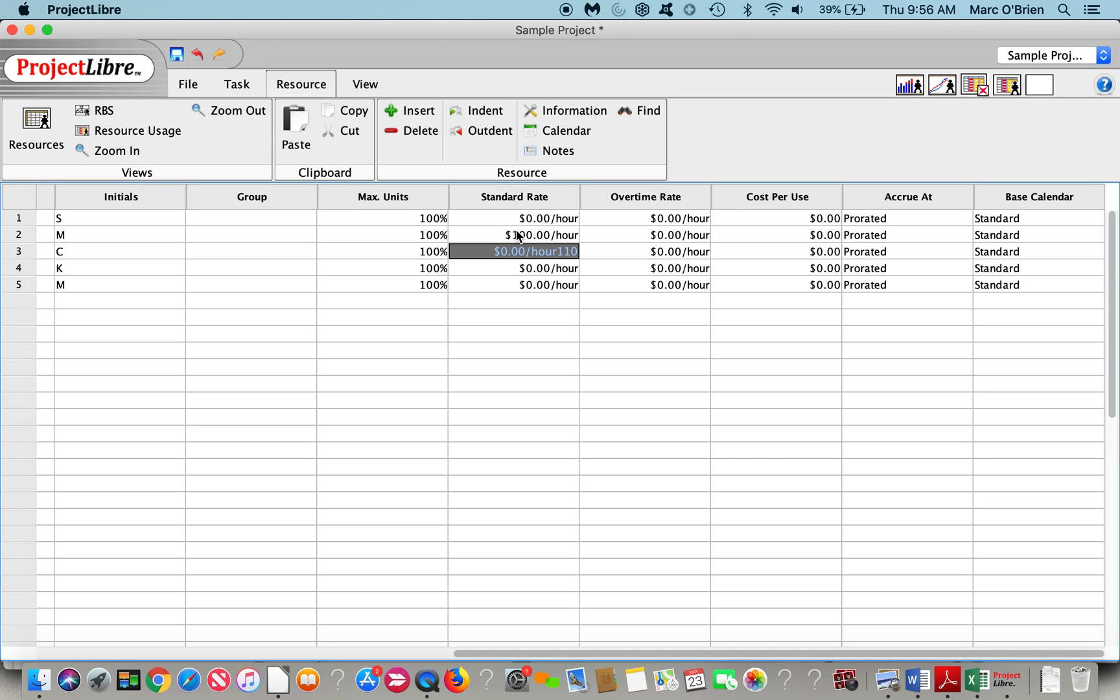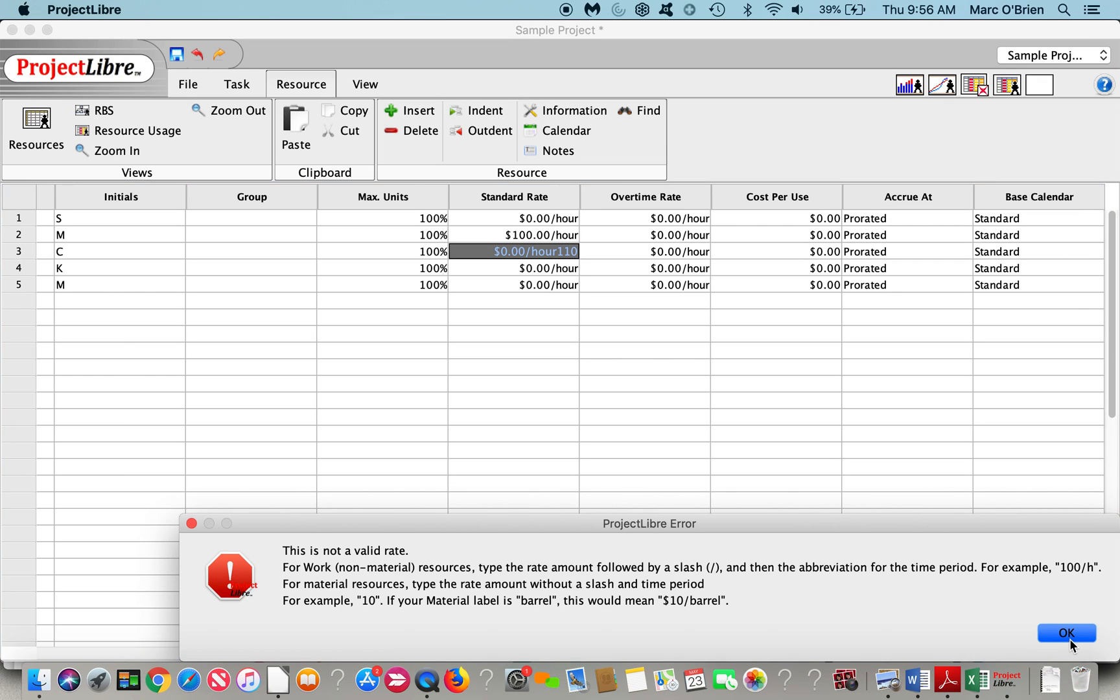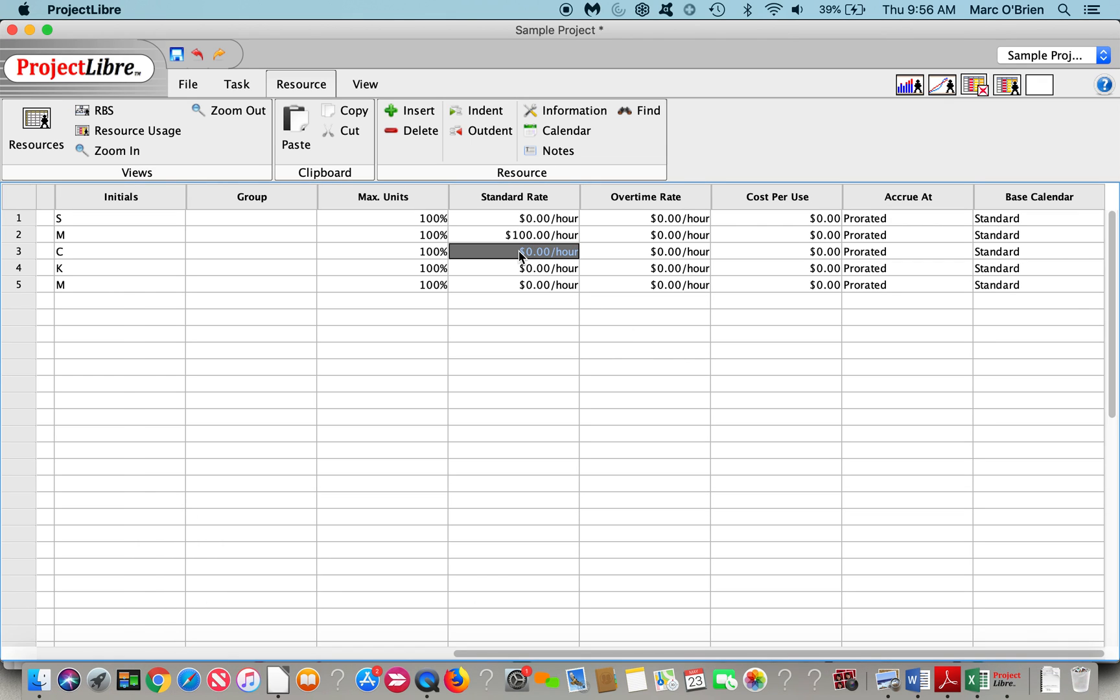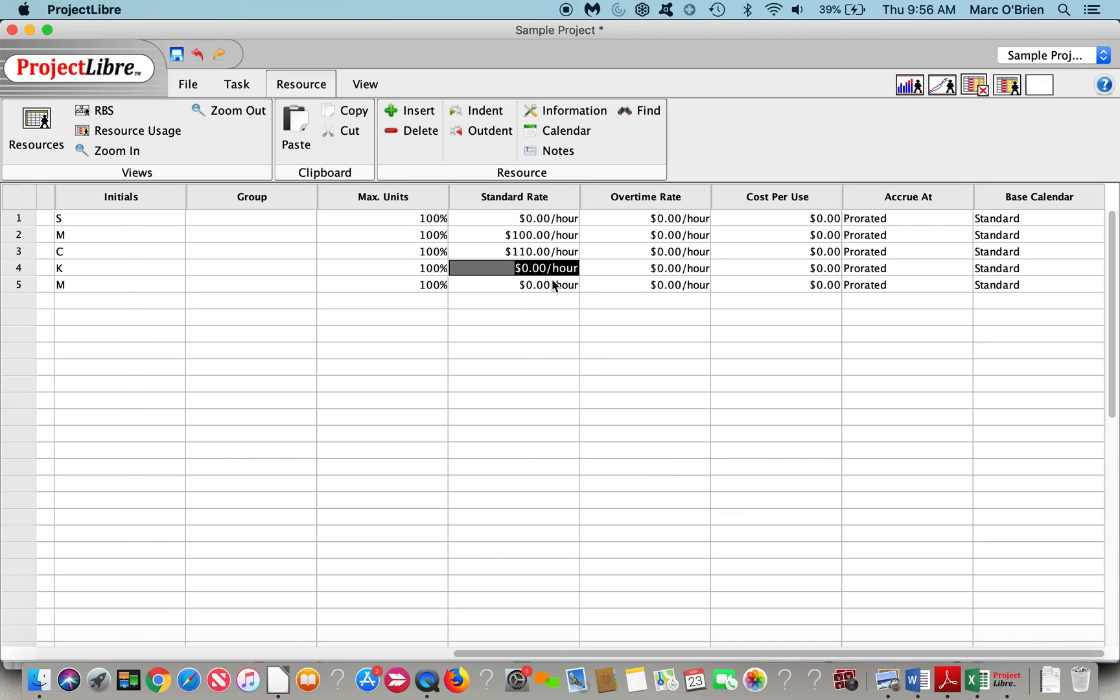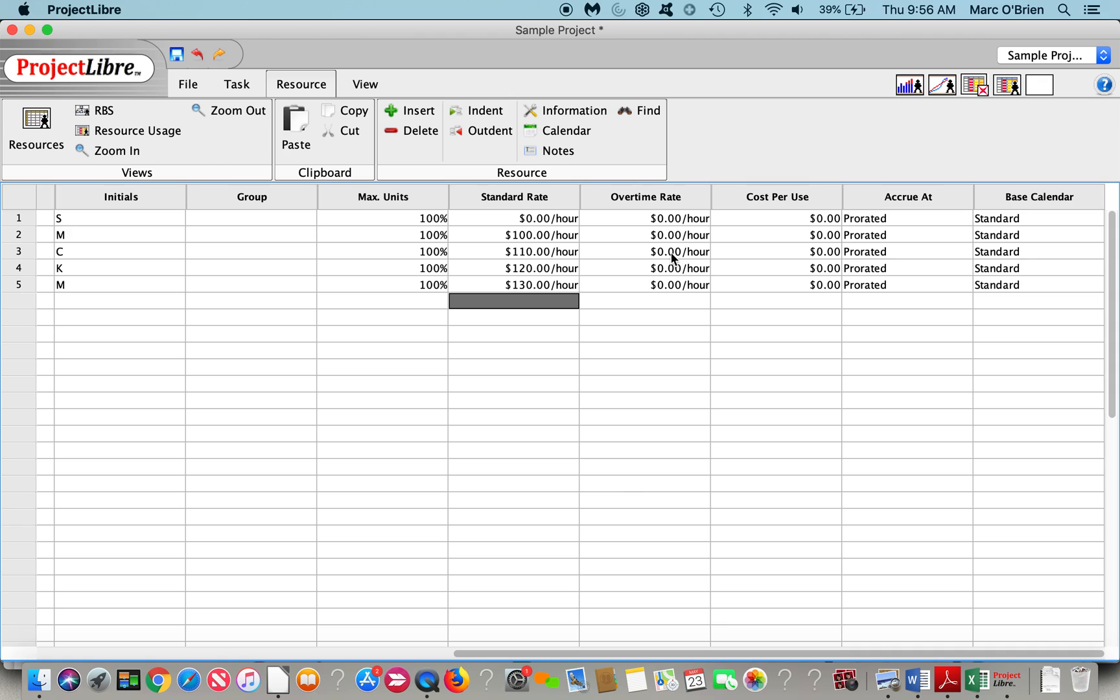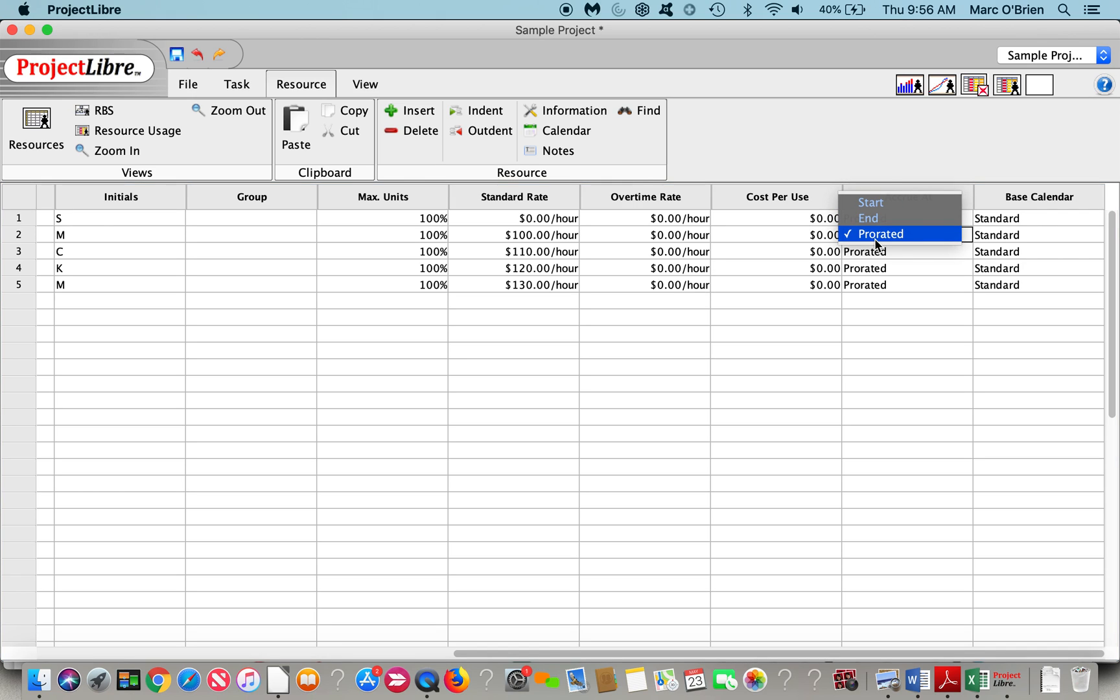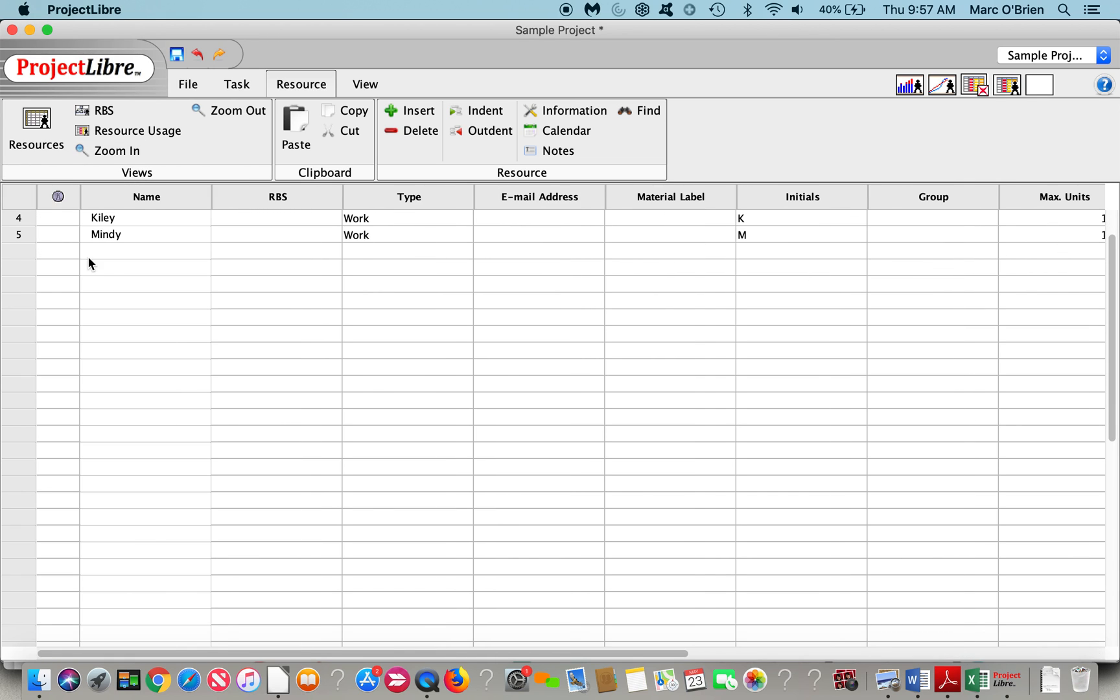I can set rates at $110 an hour, $120, $130. I can also do overtime rates. Based on our calendar, if it's an eight hour calendar, and we end up working 12 hours, there could be an overtime rate on that. We can do a cost per use, particularly for material resources, this is very good. So if you're going to put a resource to work, there's a cost per use of that.